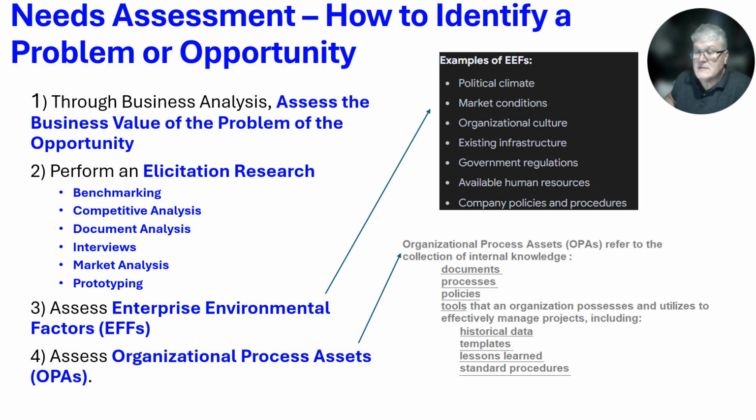You look for templates. Some companies may have a business case template that executive management likes to do. It's clear and concise, and it's a good way to get a project started. You have what's called lessons learned, and lessons learned from a project management standpoint is, okay, we've undertaken a project just like this before. What do we learn? What can we use to improve upon the process this time? And then you talk about standard procedures, and you figure out, okay, so what procedures are we going to use to initiate this project?